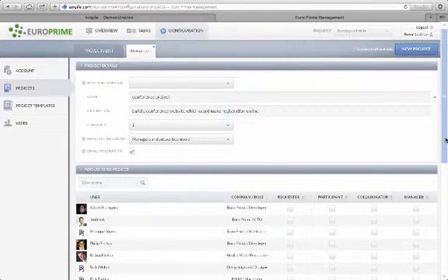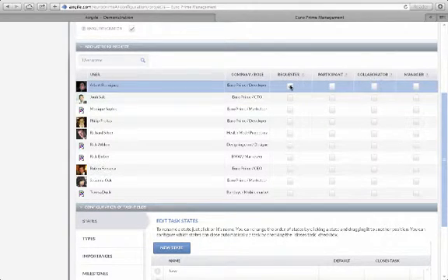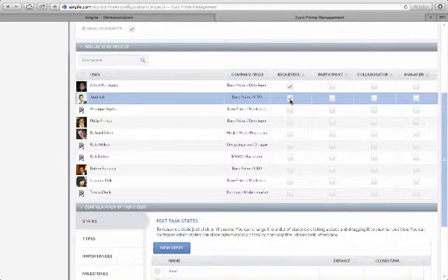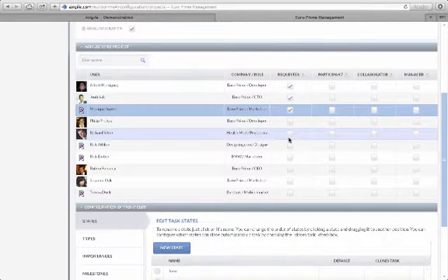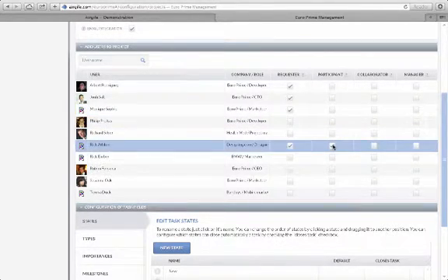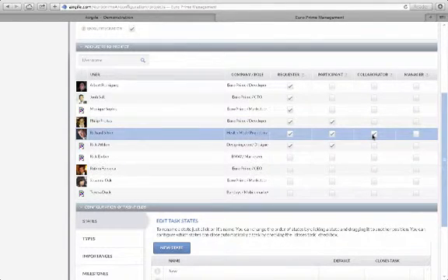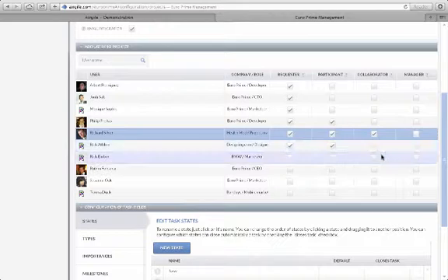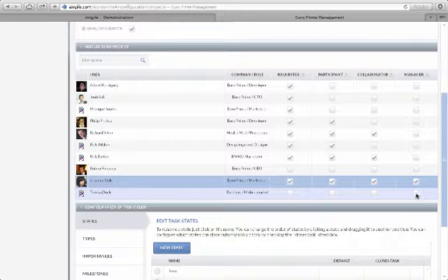You need to add participant users to your project. There are four different types of involvement. The weakest one is requester. A project requester is a user who can add new tasks, but cannot see tasks added by other users. A participant is a user who follows all evolutions of our project but is not involved in planning. A collaborator can view confidential tasks. Finally, a project manager is a user who does the planning of the project and delegates responsibilities.